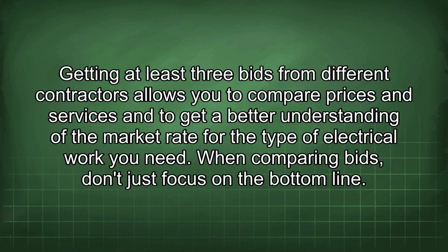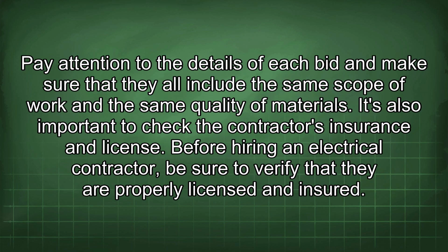You should also obtain multiple bids from different contractors. Getting at least 3 bids from different contractors allows you to compare prices and services and to get a better understanding of the market rate for the type of electrical work you need. When comparing bids, don't just focus on the bottom line. Pay attention to the details of each bid and make sure that they all include the same scope of work and the same quality of materials.